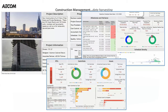Data is only as important as it can be harvested and utilized. We utilize a dashboard process that we wrote, harvesting data on demand so all of our executives have total transparency to our jobs. This can be extended to code officials as we move forward. The pandemic changed a lot about how we do things — I can now do all punch list operations through visualization from the office. We make these available to stakeholders on a project team; we reach into P6 on demand, pull data every time it's available, and publish it in a dashboard, including RFIs, submittals, and any issues. Things like startup, commissioning equipment tracking, and curtain wall analysis are all monitored. It's integrated into BIM 360 and accessible on mobile devices — cloud-based architecture, invitation-only in a secure environment.